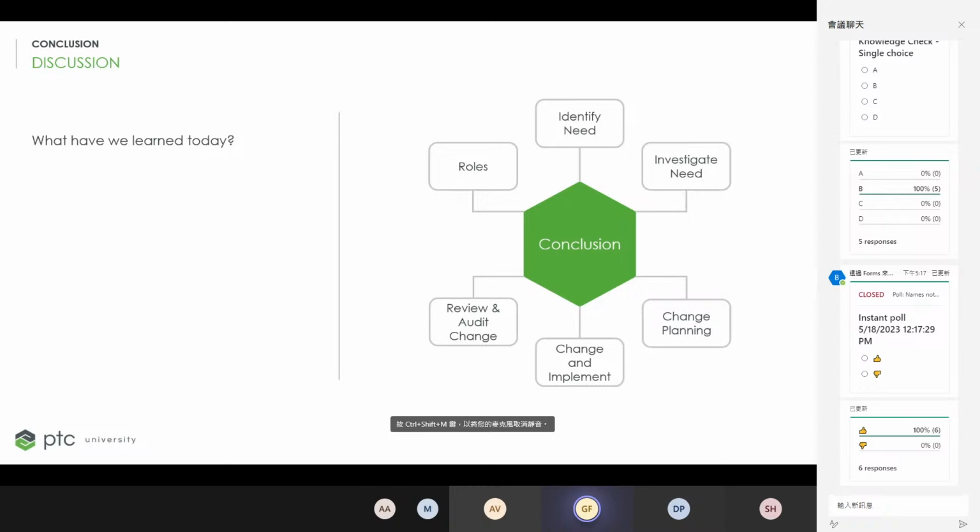And that's how a new revision or enhancement comes out, but it's not always the case. Sometimes scraps will result out of this. What you have currently in stock in the inventory has to be reworked and cannot be reused, so you're going to have to scrap all of those. But again, that's a business decision when you do an impact analysis on the costs and benefits ratio. This is a whole discussion around that. That's why we have the change review committee boards and change implementation board.